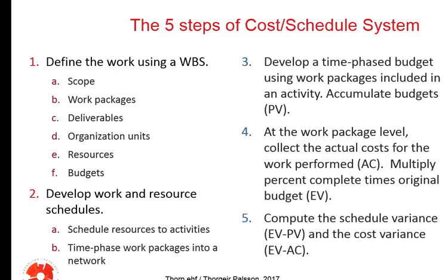Develop a time-phased budget using the work packages included in an activity, and the accumulated budget, which is the planned value or the baseline. Remember that planned value and the baseline are the same thing: the total cost of the project. At the work package level, collect the actual cost for the work performed, and percent complete times original budget will give you earned value.